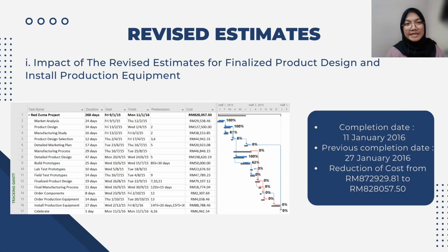As a result, the updated estimates have resulted in a completion date of 11 January 2016, 16 days earlier than the project completion date from the previous status report, which is 27 January 2016. Moreover, in terms of cost, the reduction in days of work for both of the activities reduces the cost as stated on the slide.